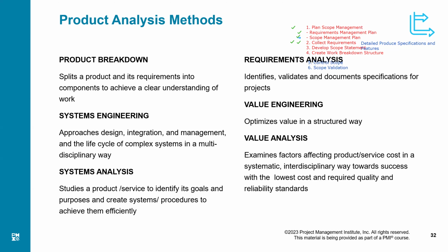This is the basic definition of the product breakdown, which looks quite similar to the definition of work breakdown structure, where the work is being broken down, the project scope is being broken down into smaller parts, phases, or whatever, and into work packages and all that. So that is the work breakdown structure. But when we are doing the product analysis, we might be more interested in what are the parts of the product which are to be developed and when, right? So yes, there is a concept of product breakdown, and this is very common.